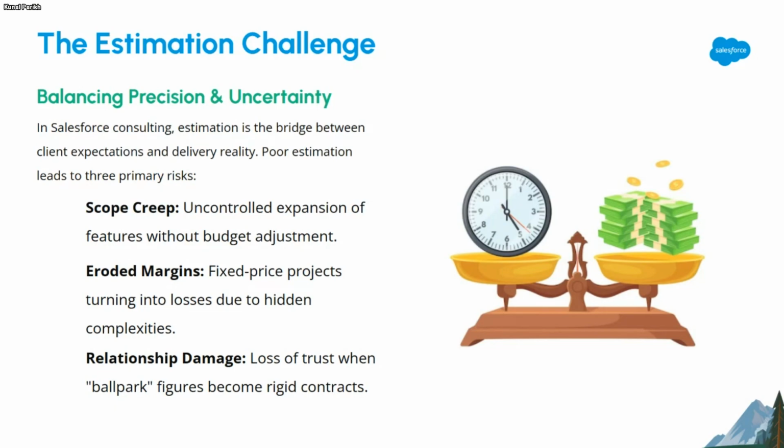And to balance that, there are three primary risks that come in. First, you identify the scope correctly, you note down the scope correctly, because if there is scope creep, say you've given an X amount, but because of the scope creep you will have X plus Y effort. Then it becomes a scenario where you incur losses because you've not budgeted or estimated for that.